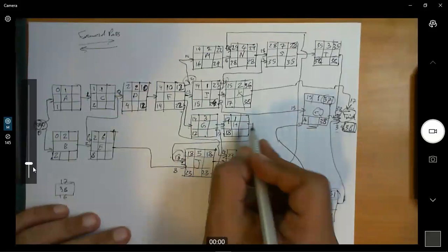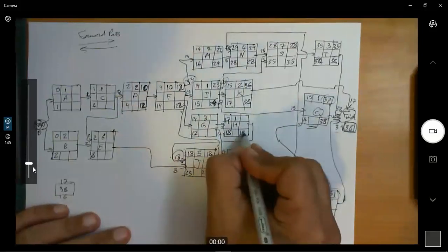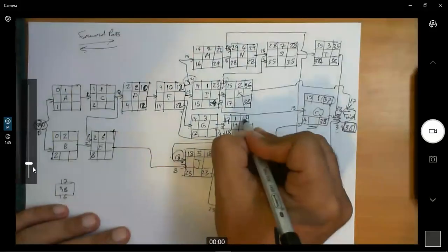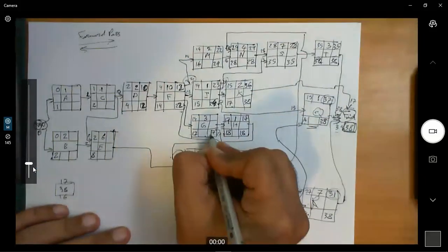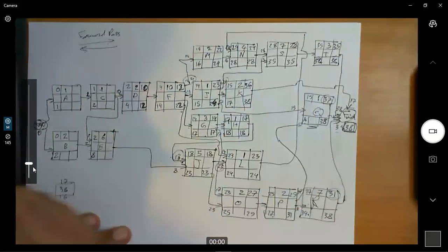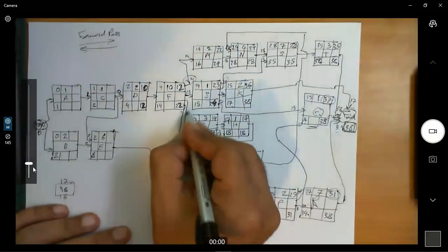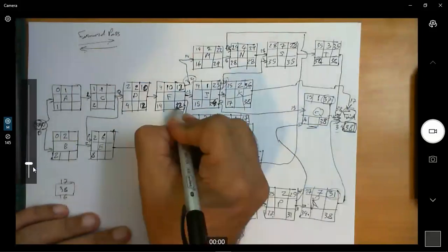Okay, we need to finish this one. This one, the latest it can finish is 18. The latest it can start is 17. So of course this one's going to be 17. 17 minus 3, 14. Okay, so actually we made a mistake because we didn't take this arrow with us. This 14 should be 4.